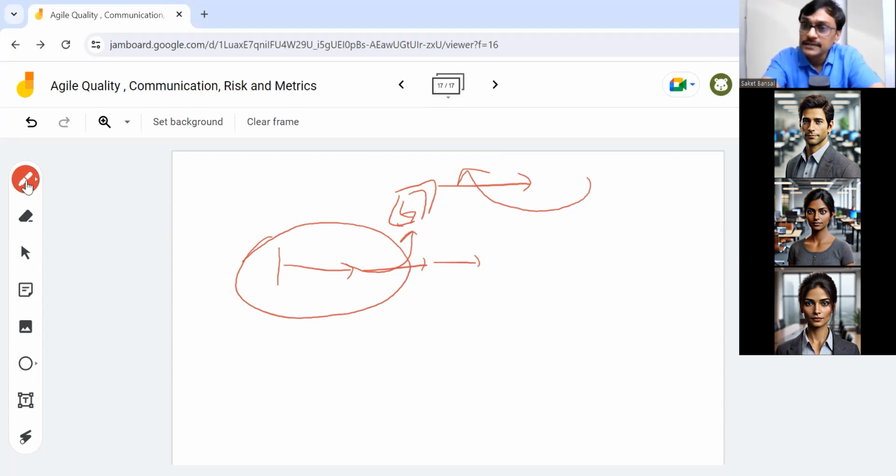Many a time we just count how many escape defects we got in a given month or a given week. This is usually considered when we cross our boundary. Now, sometimes in a multi-team environment, it may not be going to the customer, but going outside your team's boundary, something which the team said was finished. From our side, we have delivered it, and later on someone else is saying, guys, this was not working. Just counting them is called escape defect. Now you can have a weekly bar chart, monthly bar chart. You can show a trend of the escape defects over a period of 1 month. Those could all be a presentation, but it's just a count number observed in a given duration.